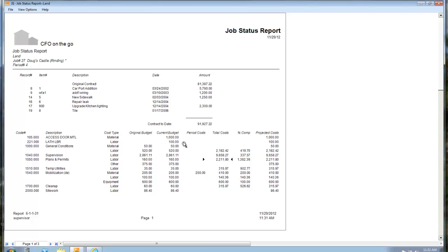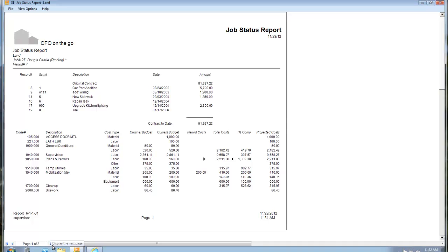The last thing here, and I like it, some people do, some people don't, is this last column over here called projected cost. And so we do something really simple. We look at the budget, and it's 1,000. We haven't spent anything yet, so we're going to carry that 1,000 over. Down here, we've got a bad item where we only budgeted 2,900. I've already spent 10,000, so it brings over the 10,000. This is not a forecast. It's just basically making a real simple calculation for you.